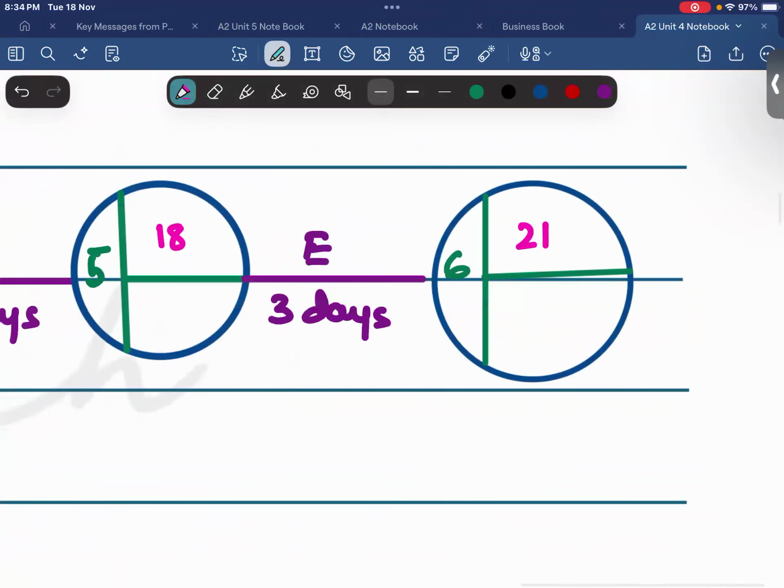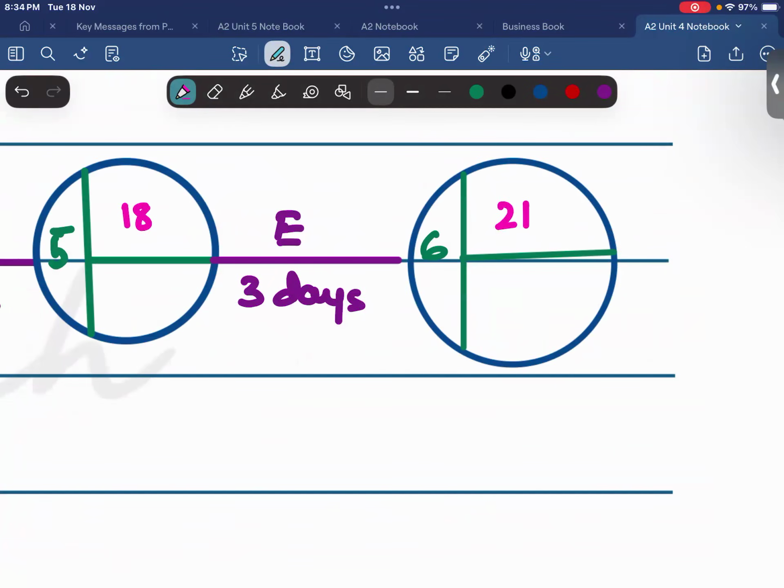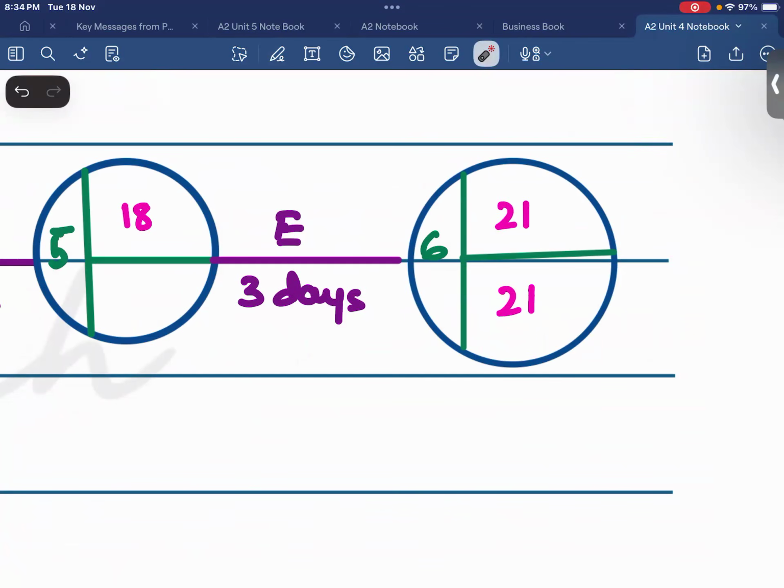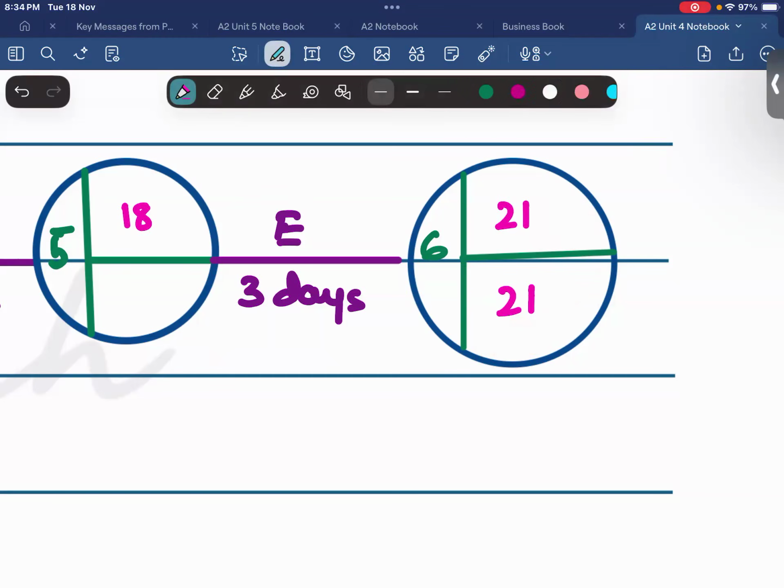So always remember, guys, that the LFT of the last node is the same as the EST of the last node, because after this there is no activity. So this is not actually the starting time, this is the ending time of the whole project. So the ending time of the whole project is your LFT. So in the last node, your EST is the same as the LFT. Now we are going to subtract. So 21 minus 3 is 18.